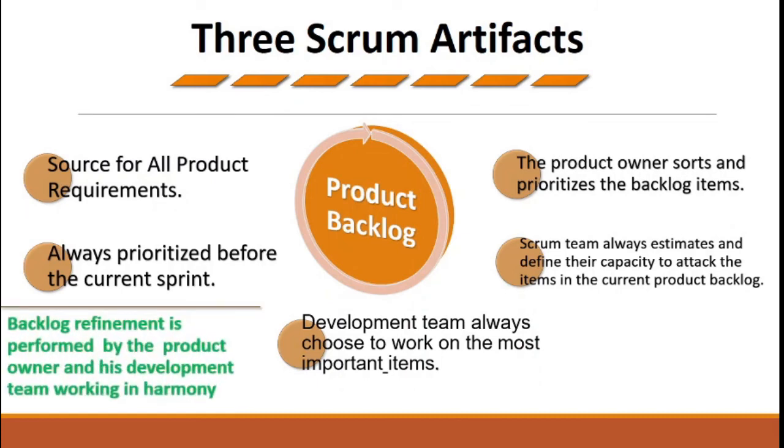And lastly, the backlog refinement, which means that once the product owner and the team have gone into the sprint and have completed all the deliverables they were supposed to build in that sprint, they'll return back and try to update the product backlog, because refining the backlog is an ongoing activity.